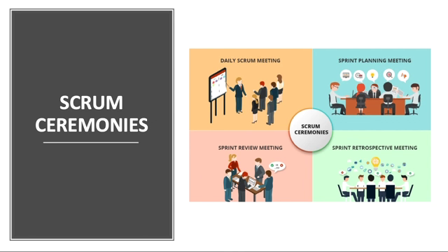And finally, we have the sprint retrospective meeting. The focus of this meeting is to continuously improve the process. So basically, this is where we analyze all the things that happened in the sprint and where we improve the process for the next terms. At the end, the team must have identified at least 3 or 4 improvements to the process. It takes 3 hours for a sprint that takes a month.